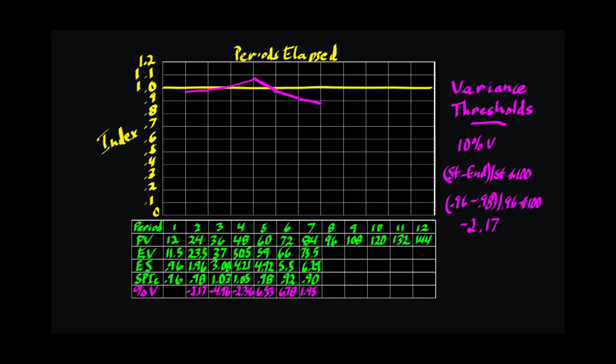Taking the high and low values of the first trend gives us an increase of about minus 9. So it does not break the threshold. However, the second trend gives us a decrease of about 15%, which clearly breaches the threshold. The threshold breach indicates a need to take immediate action.